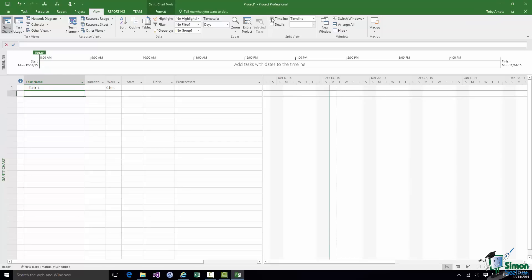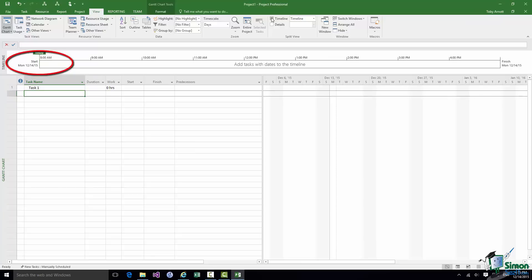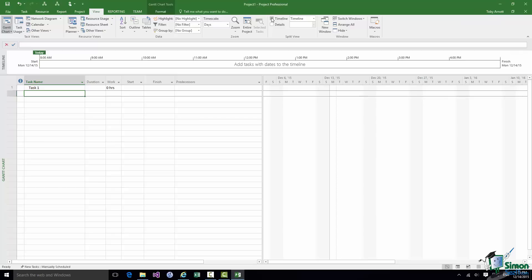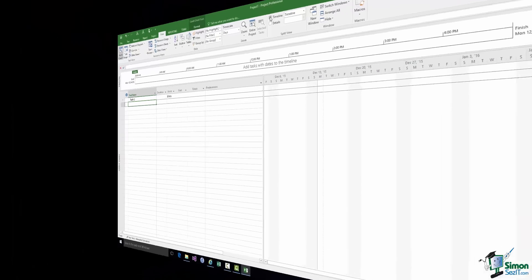When I've got some tasks it will show those tasks on the Timeline. Now in fact I've just entered one task although it hasn't got any work in it and the Timeline can be set to run over a period of time. Now by default my new project is starting today so that's December the 14th and because I haven't got any tasks or work that involve anything in them the end date, the Finish Date at the right hand end of the Timeline is also December the 14th. So it's not the most exciting project in the world at the moment. I'm not really doing much and therefore it's one of those situations where I can safely say that my project is on time.